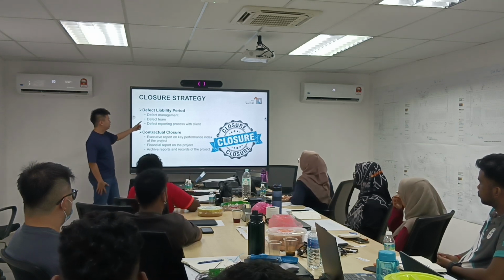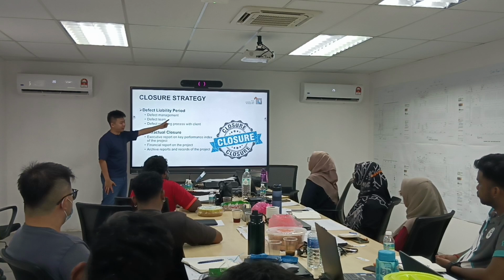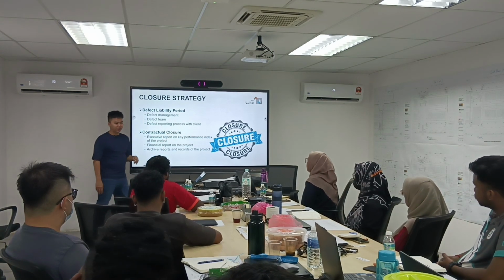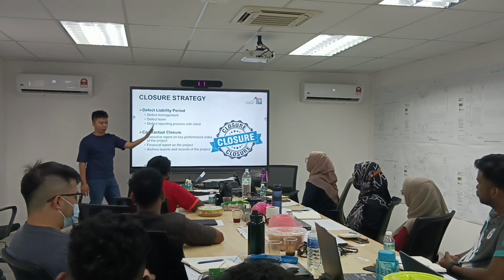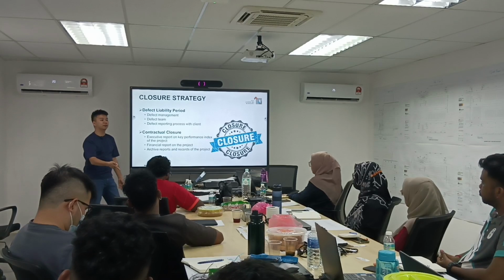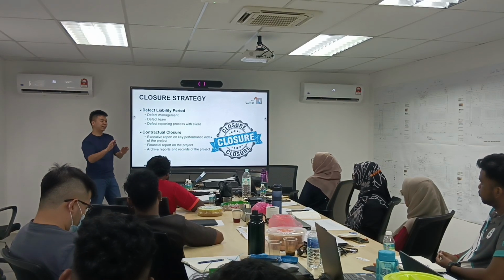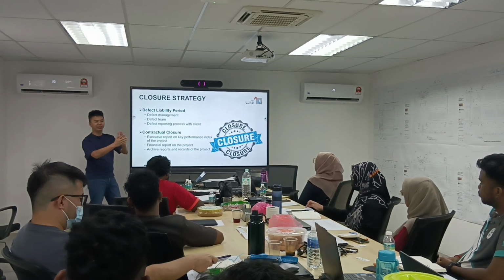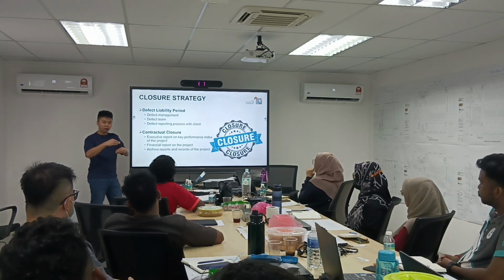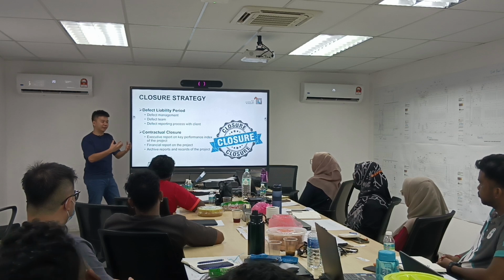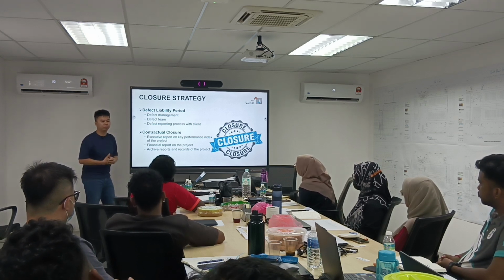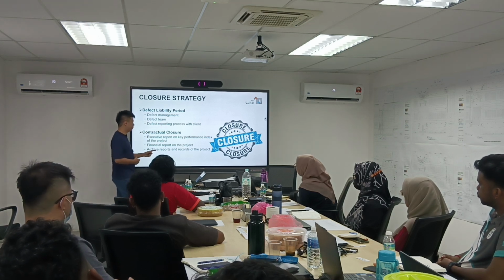Okay? So once you can manage a defect, you have a defect team, then the reporting process to the customer is very clear-cut one. This is a defect list you give me on what date. This is the rectification that I have done on what date. You sign off already. Okay, no argument. Instead of every now and then, every few weeks, you can see Matthew and Alvin start fighting already. Yeah. Why these all sort of unnecessary friction happen? Because of no one is doing the documentation. Okay? So this is defect liability period.